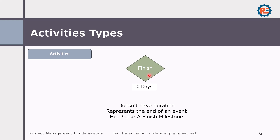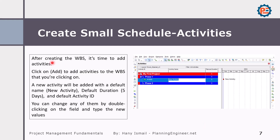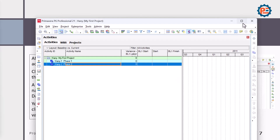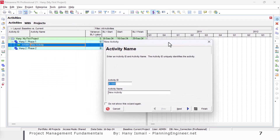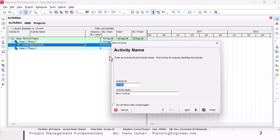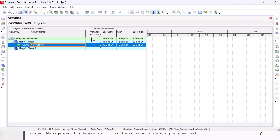The finish milestone, similar to the start milestone, does not have duration. It represents the end of an event — for example, Phase A finish milestone or project finish date. After we create the WBS, it is time to add activities. Simply go to the WBS where you'd like to add an activity, click add activity, and a window will pop up asking you to name the activity and provide an activity ID.